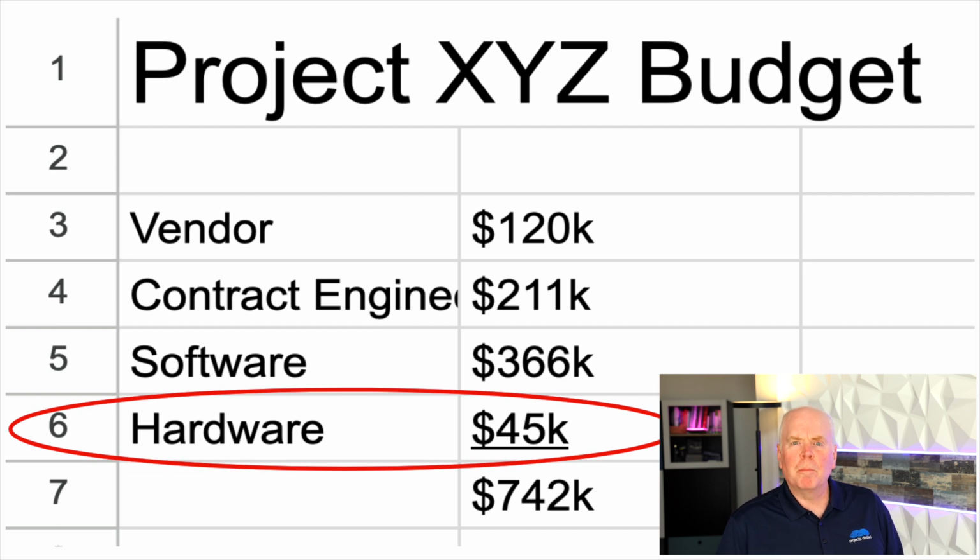But there's usually also maintenance costs that's about 20%. That number has to be broken out. See, not all dollars are the same. We need to get down and double click on some of those details. So yes, that's the quote that the vendor provided. And yes, I know that took work for you to get that, but there's still more work to do to make that budget number really understandable by management.